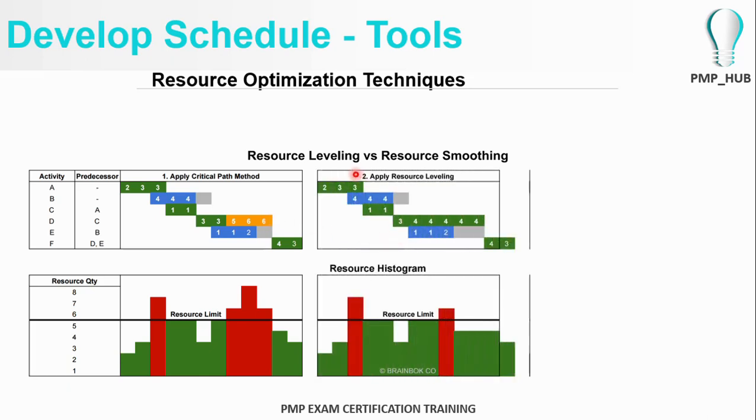So under resource leveling, definitely the project end date will shift. So we can start with 3, 4, 4, 4, 4, 4, because 4 is the maximum. The total together is 23 man months, which is equal to this one. Point to note is that the project schedule has shifted backwards because of the resource leveling.